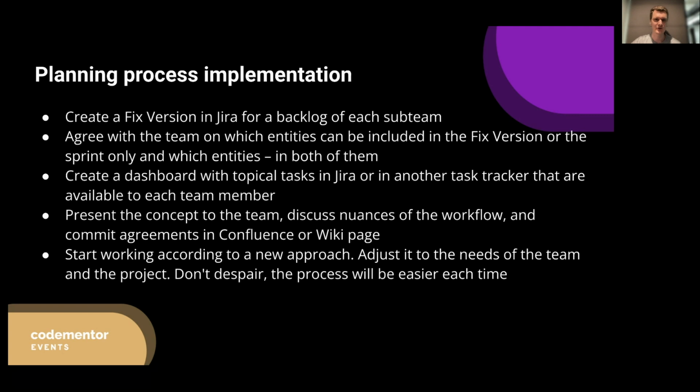Create a fixed version in Jira for a backlog of each sub-team, what we have talked about before. This is the way each sub-team could manage their backlog. Not only backlog, track also technical debt for development, and technical debt optimization for QA, etc.